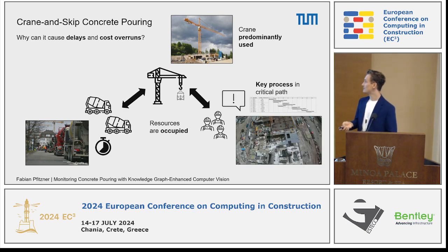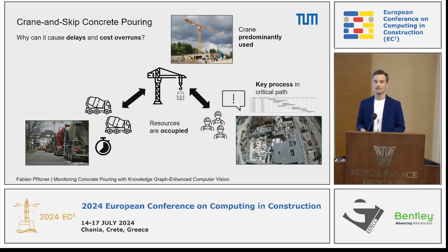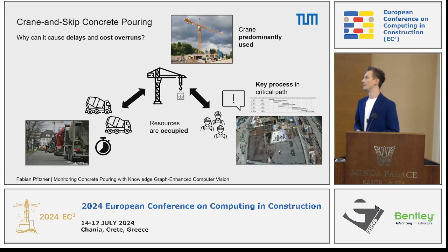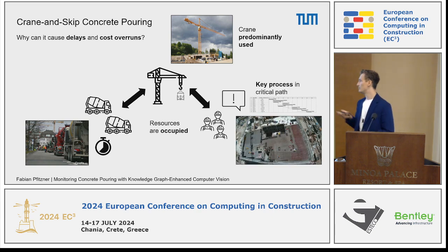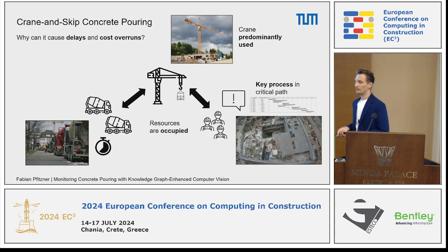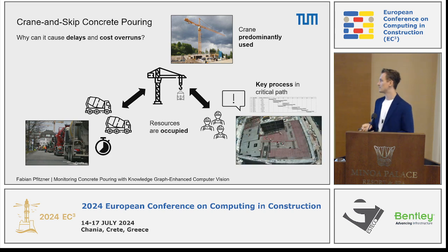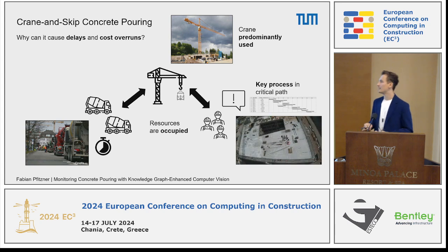And last but not least, concrete pouring is a key process in the critical path, right? We need to first build the foundation to carry out other processes. We need to build every level before we can do all the sub-processes, so to say, and if there are some delays happening, further processes also get delayed.